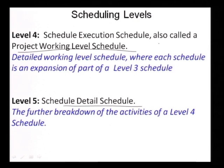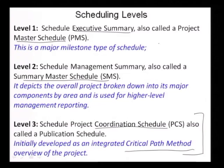For level 4, it will be going to the execution team, and level 5 will be the detail at the craft level — they should know what the detail schedule is. By going through these levels, you get an understanding that your project organization and your scheduling functions have to be correlated. Without that correlation, you will not be able to give the right report to the right person.